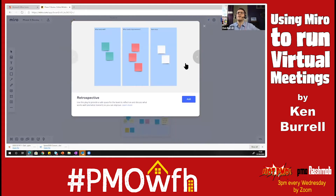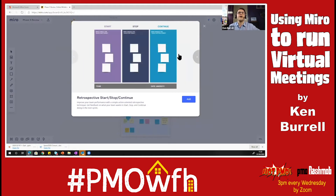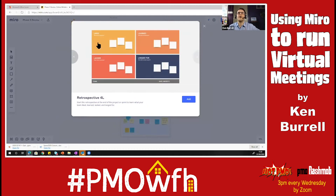There are a number you could use for a retrospective or lessons learned session. There's this one — retrospective: what went well, what needs improvement, next steps. A different kind of retrospective: what was good, what was bad, ideas and actions. Start, stop, continue. This one I hadn't seen before but quite liked: liked, learned, lacked, and longed for. Love a bit of alliteration.